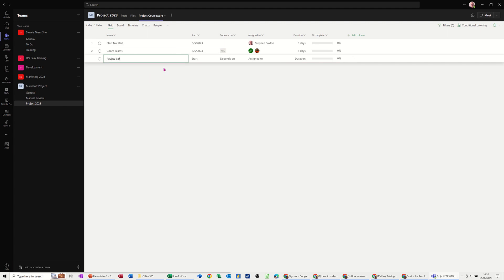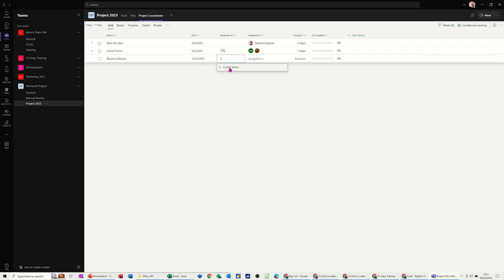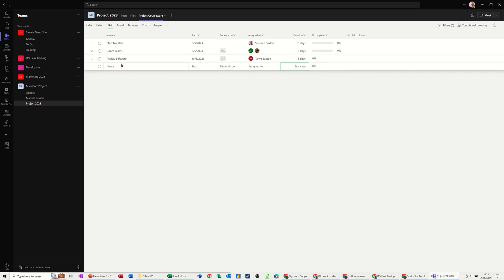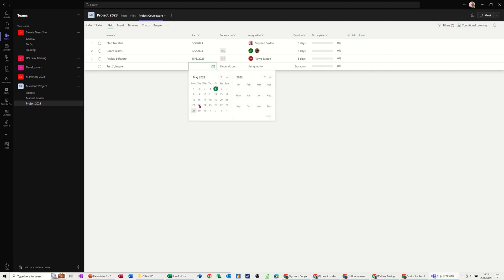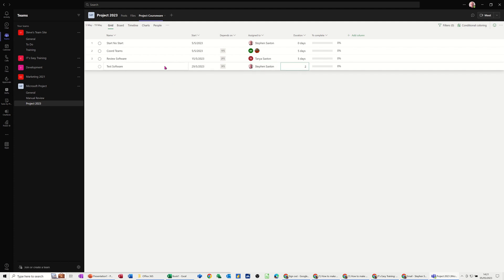Then I'll do another new task — Review Software. Start will be the 15th and it depends on task two. I'll assign that to Tanya, duration again can be five days, not complete. Then one more — Test Software. That starts on the 29th, depends on task three, I'll assign that to myself, and duration can be two days.